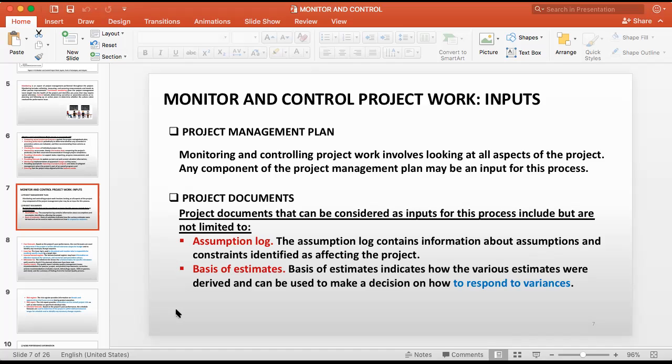So we said you are not going to use machinery. The assumption is that in this area we have archaeological monuments, so we will start with manual excavation and show these to the archaeology department. Under the supervision of the archaeology department, you have to do the excavation. So we assume that there are some monuments down there.